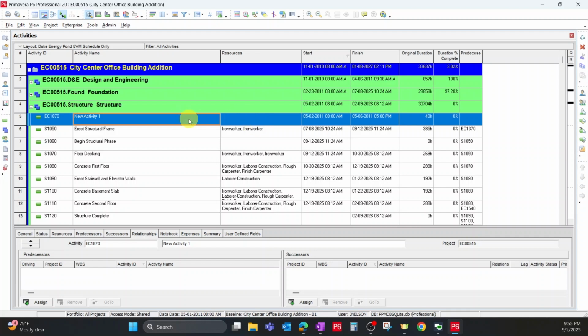So it's really nice to use those for estimates and cost controls, so you have a unique identifier for your activity. It's a unique number series that you don't have to have the actual entire task itself. The activity name, you could just shorthand it and have the activity ID.